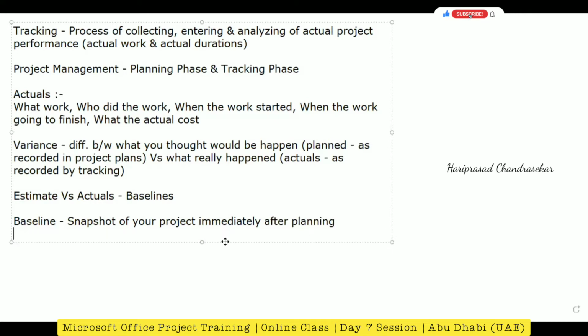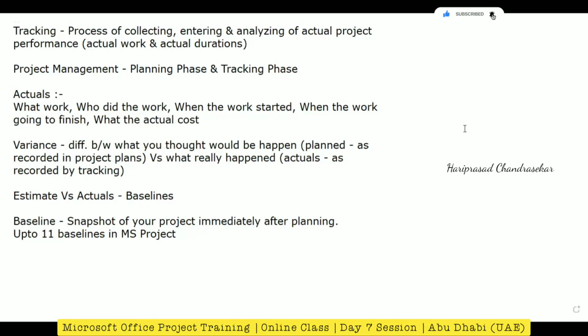So we can have multiple baselines, and in this tool we can have up to 11 baselines. And you can choose which baseline to display and which baseline to compare with the actuals. Now we will see these topics in MS Project.